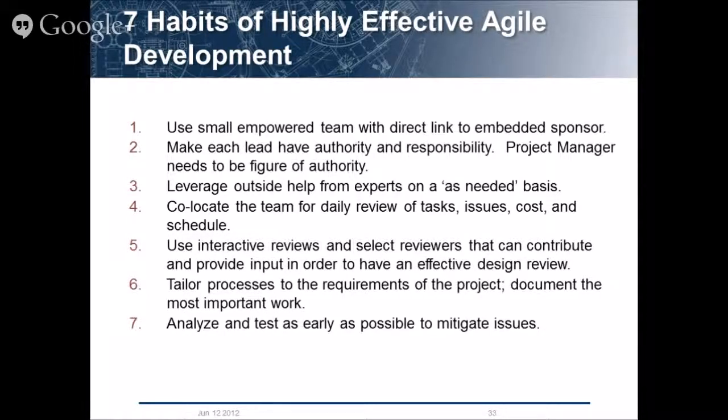So if the schedule slips, the cost skips and all that, and we have our fixed requirements, and then we just go and ask for more money. Well, I think those days are over. I don't think we're going to be able to do that much anymore. So what we did instead was we had a fixed cost, fixed schedule, and we floated the requirements.